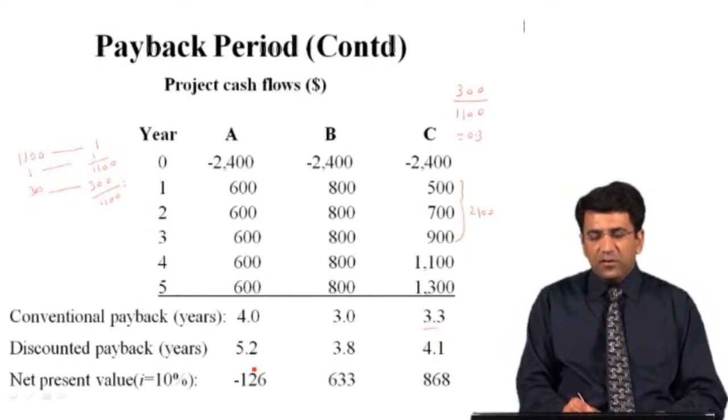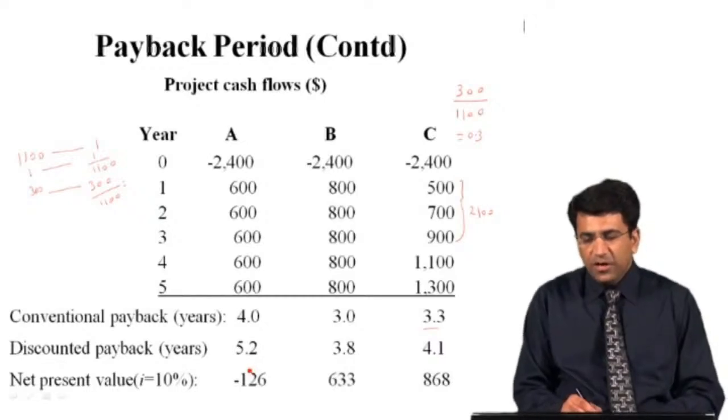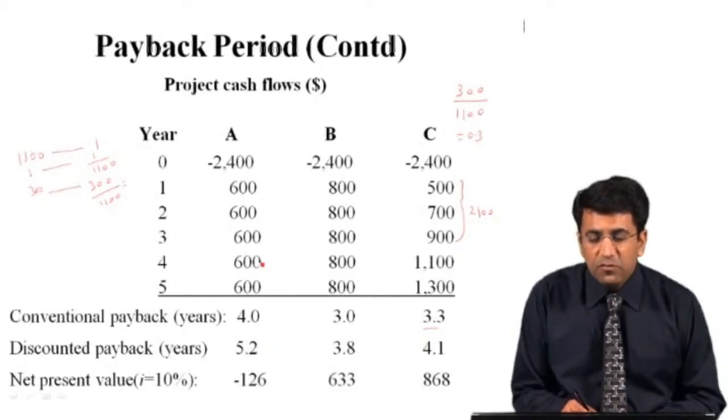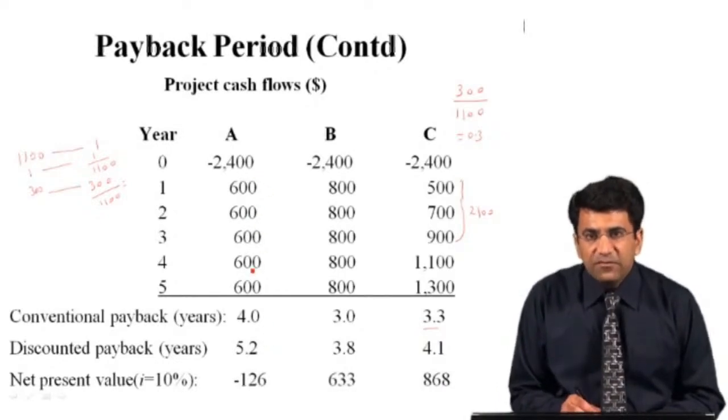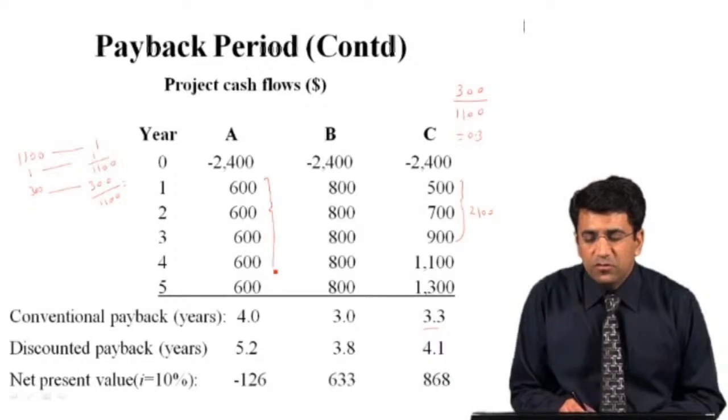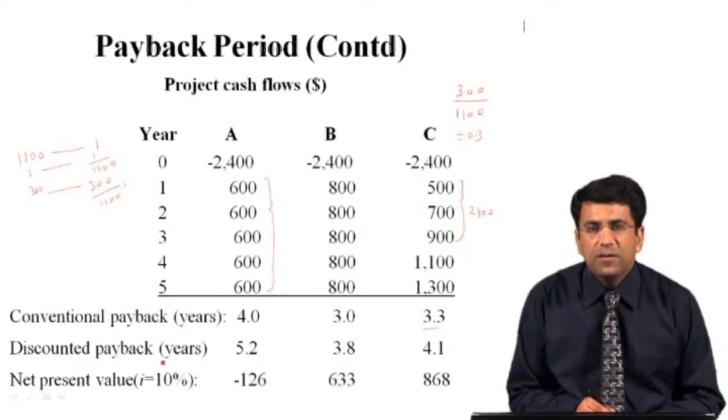Similarly, students, we can also calculate the net present value and the discounted payback period for these projects. For the discounted payback period, we will have to discount all of these values. Yet we have not discounted these values, and without finding the present value of these different cash flows, we have taken into account the different payback periods. But if we first discount all of these values and then calculate the payback period, it will be termed the discounted payback period.